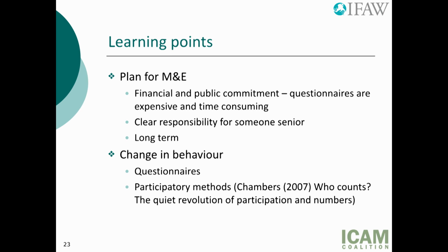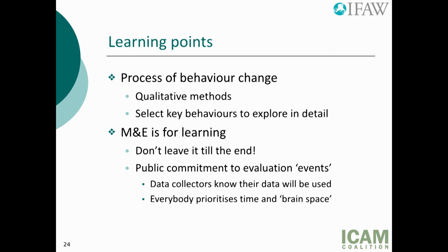When we start to look at that process of behaviour change, we need to start looking at more qualitative methodologies. And they can be quite time-consuming, so this is when we want to start selecting key behaviours that are particularly relevant for the community in question. Monitoring and evaluation is for learning. Please don't leave it to the end. The point is that you do it throughout the project lifespan and you're constantly adapting and improving as you go.